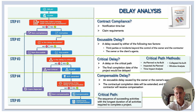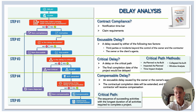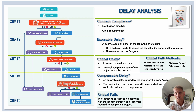If the contract is in compliance, one moves on to step two — excusability — determining whether this delay event is excusable. Excusable delay is a delay caused by third parties or incidents beyond the control of both the owner and the contractor, or something caused directly by the owner or the owner's agents. The contract would also give guidance on what qualifies as an excusable delay.